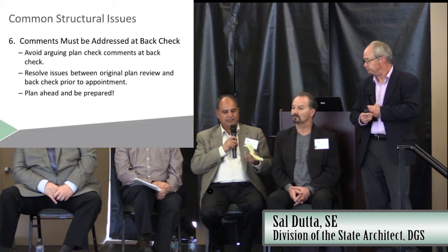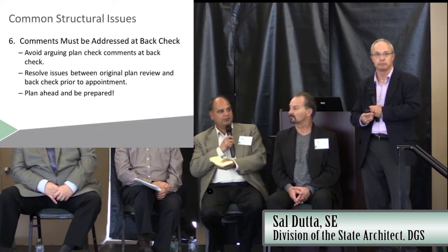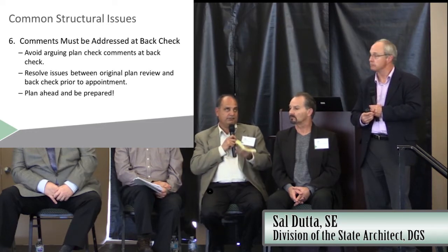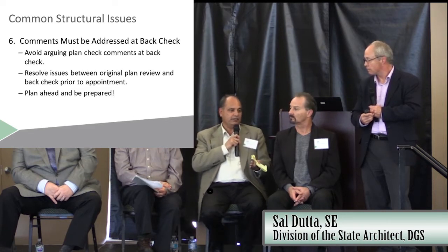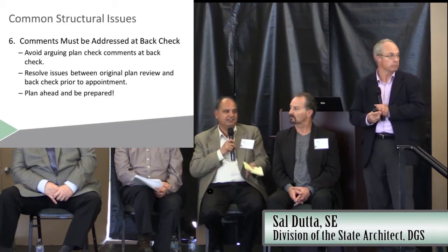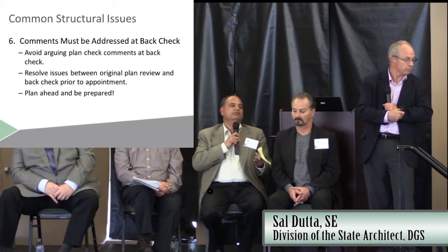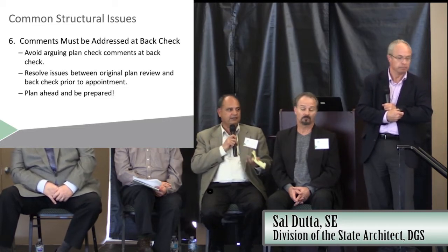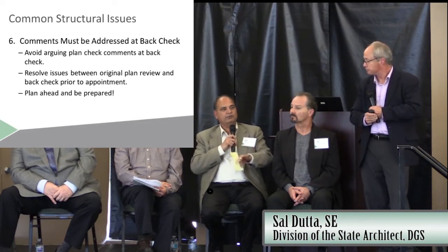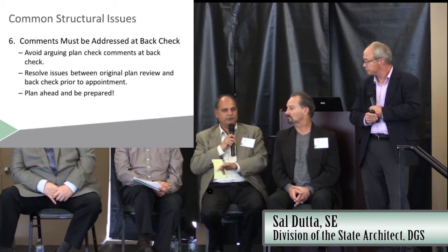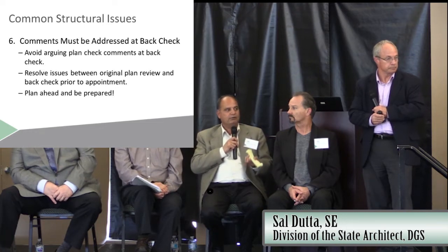The second thing is that lately, on larger projects, I've been saying: just like you make an appointment for plan submittal, we want you to at least tell us when you're going to submit. A lot of the time when we give you 1 week and the plan checker is busy in the back check room, he doesn't have time to look at your responses, and all of a sudden the back check date comes. So on larger projects we're asking you to tell us when you're going to submit, so we make time to re-review your project before the back check. And major comments, get them resolved before back check.